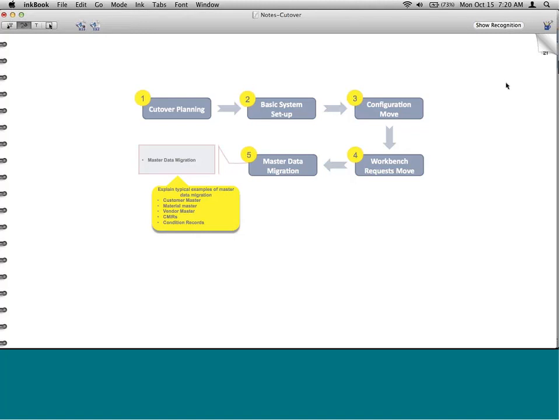You know what master data is. Can master data move after transaction data? No. Simple example is, for example, customer 1000 needs to go first, and then orders related to customer 1000 can go. If this has to go first, then it will fail if you have not created it. As simple as that.